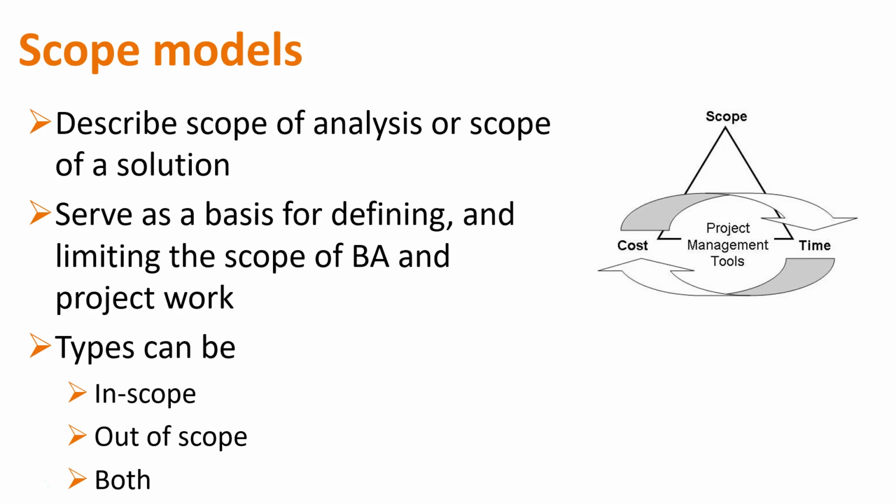And then what I'll do is go through the analysis process. And as we're going through the analysis process in strategy work, where I'm figuring out what is it that we need to change? Where are we? Where do we want to go? What's the difference? When I figure that out, I start figuring out what pieces of that solution scope I'm going to have to work on change. And then I take my model and I draw an in-scope line around everything in scope.